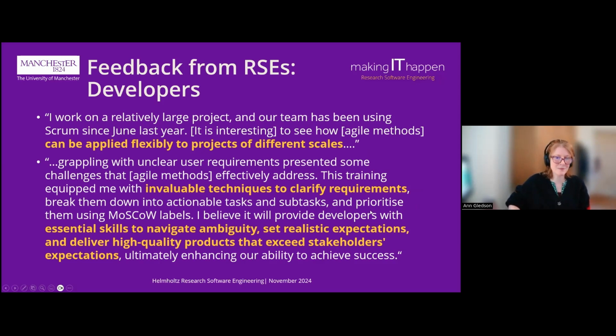That's definitely what we found in a lot of the projects where we use it. It's really good at counteracting ambiguity as well, and setting realistic expectations of what can be delivered, because it becomes very clear very quickly if the PI of a project starts throwing in extra things all the time. If they want those extra things, something fixing, or just come and help me with this student seminar presentation I'm doing, then the tasks that are on this sprint are not going to get done if they're being pulled away all the time to work on other things.